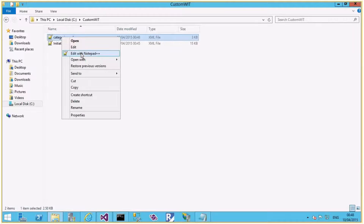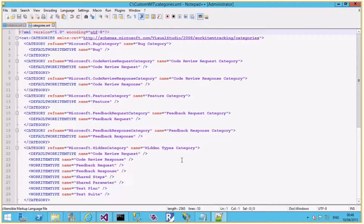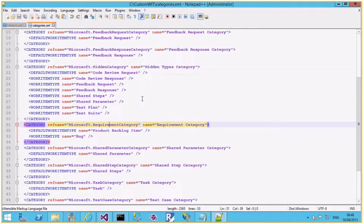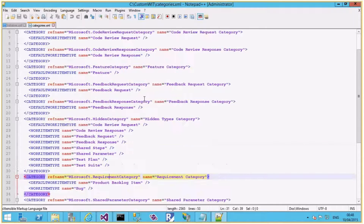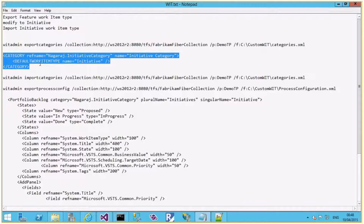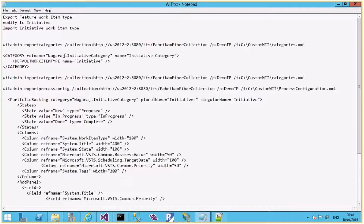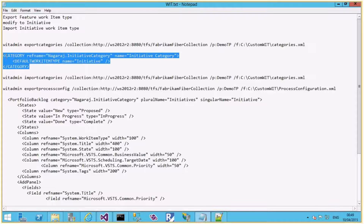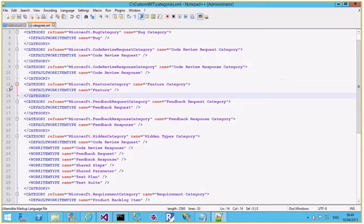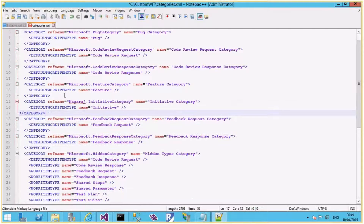Let me open and edit the categories.xml file. I need to add a new category for the Initiative work item. Just as we have categories for Requirement and Feature, we need one more for Initiative. I've already written this: the category reference name is 'nagraj.InitiativeCategory', the display name is 'Initiative Category', and the default work item type is Initiative. This defines which work item type belongs to the Initiative category. Let me add this to the category section and save the file.